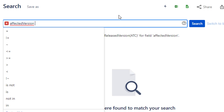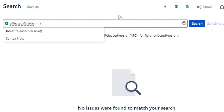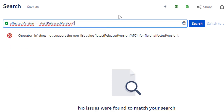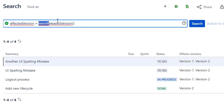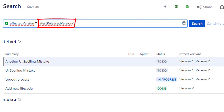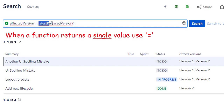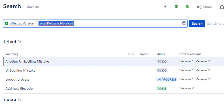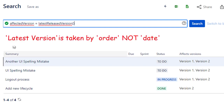To narrow things down further, you can use affected version equals latestReleasedVersion. Note we're changing to equals because latestReleasedVersion returns a single value, not a list. When a single value is returned we use equals; when a list is returned we use IN. This query shows all issues where the issue affects the latest version to go out the door.